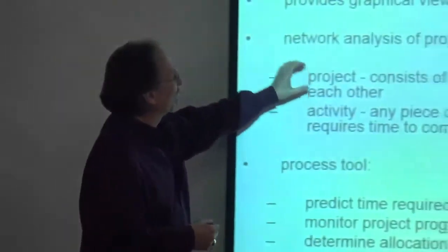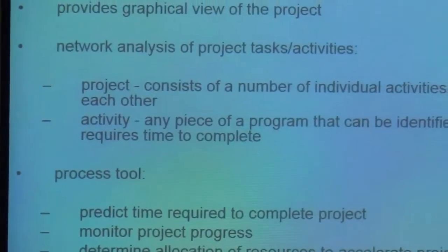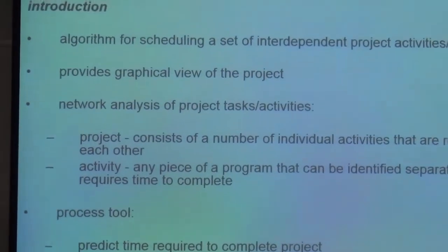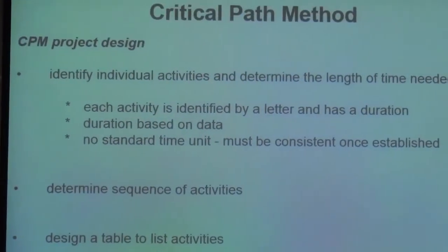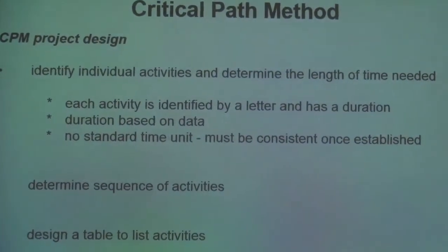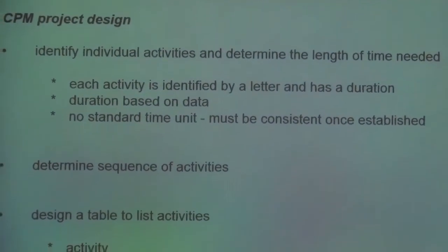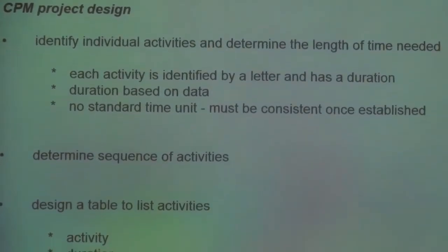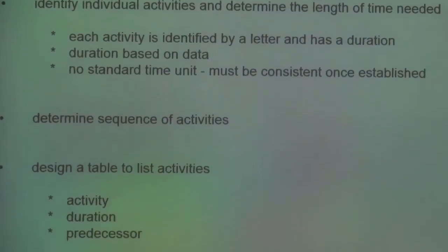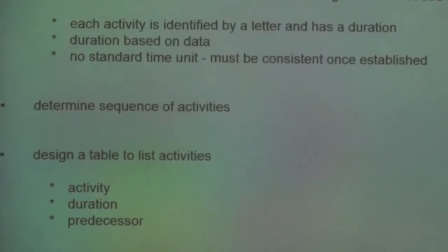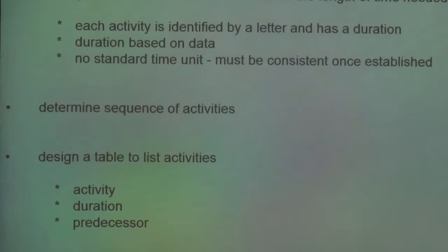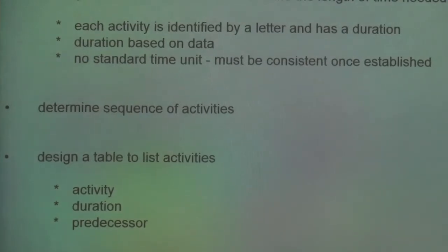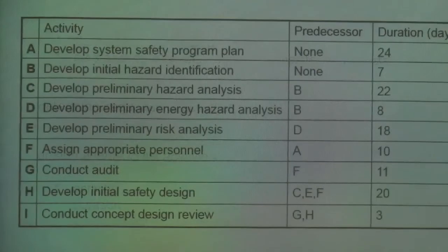It's an algorithm and it's graphical. And what we do is we have activities that are part of the project. We need to get off of that slide. You can look at it later. What you do with each one of the activities is you determine how long is required, the minimum amount of time to perform the activity, and what has to precede it, and what has to succeed it in your process plan in order for it to successfully occur.